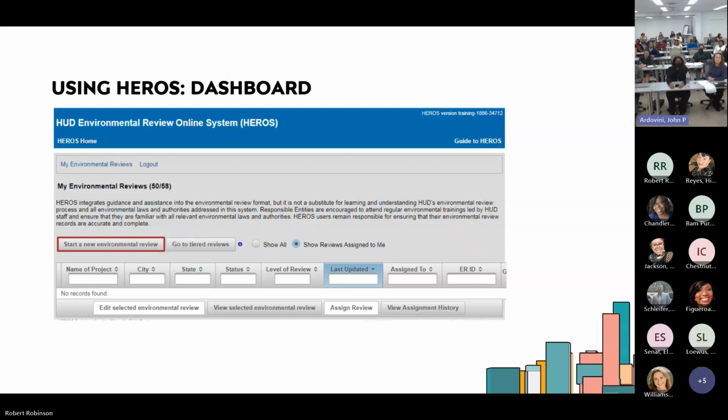So the good news about that, Roger, is if you have one that engages early, and we've seen this a couple of times, they can let it go early. But if they engage early and they want more stuff, it can actually go longer, because likely when they engage with you, they want more information. So they get it, you respond, they respond, you respond, and it takes 45 days instead of 30 days. So if SHPO engages with you, that can be a good thing, but it's often more likely a bad thing. Okay. Thanks, Kara. It's a complicated thing.